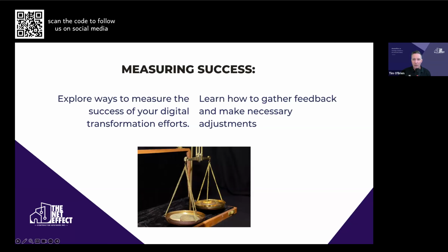Another one, of course, is professional services fees. When you hire the Net Effect to help you manage all of this, what are our service fees over the year? And then I've forgotten the fourth. There was another one. The downtime. Downtime is another one that's a little more intangible. Because if you're going to spend time and you're paying your staff to do something, that means they're maybe not doing production where they're actually making money. So there's a bit of that as well.